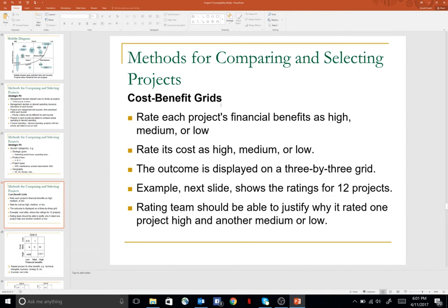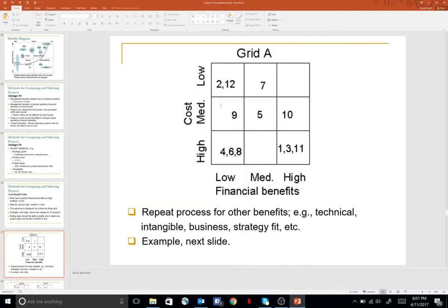One of the things that we do, especially later on in the life cycle of a project, is check whether or not it is reaching the point of diminishing returns, where I continue to invest, but the return that I'm getting back on that project or projects is no longer a linear relationship, but it's starting to taper off and it's more asymptotic, and we see some curvature. So at that point, I would say that I'd probably need to terminate the project and replace it with some new technology altogether. Okay, so once again, many different resources or approaches, I should say.